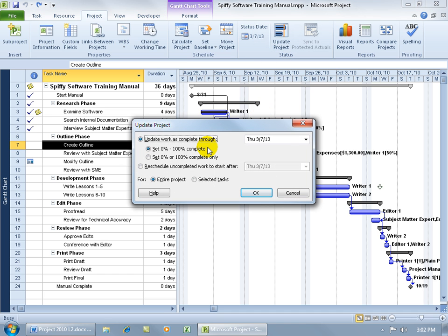You've got two options: Update Work as Complete through whatever date, and so you can say everything through this date is going to be 100% complete, or you can set the percentage. In any case, that's not what we're going to do here.